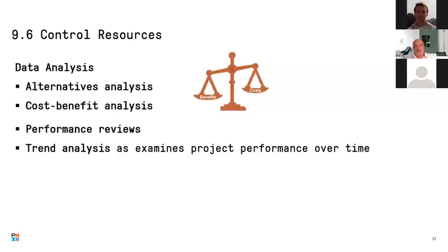Let's say I am doing a maintenance every month. So this is a cost. Or will I do a maintenance every 2 months? That's another cost. Each one has a different benefit. So I have to compare the cost that I'm doing to the benefit that I'm getting in order to assess the different options that I have.